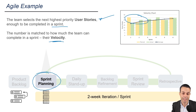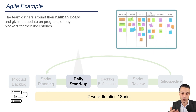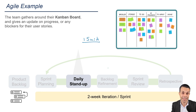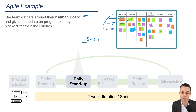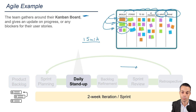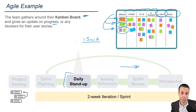All of this is done during sprint planning or iteration planning, where we plan the work for the next two weeks. As the iteration progresses, we hold our daily stand-up every day, around 15 minutes, usually standing up to keep it short. The team gathers around their Kanban board, which shows all user story cards and how they're progressing — from backlog through development, testing, sign-off, all the way to done. The team gives an update on their progress and reports any blockers so we can swarm around problems and unblock them quickly.